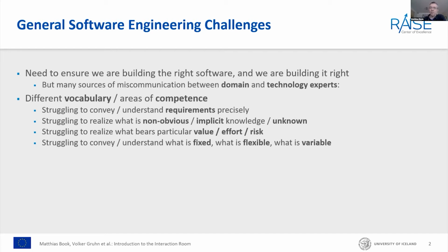So the domain expert might say, well, if we don't get down to this level of precision, all the results will be worthless. The technology expert might say, well, if we are talking about this level of precision, that would require us to invest much more effort into computing resources or into the development of algorithms and so on. And so these value and effort drivers can easily become risk drivers, can become aspects that can derail a project if they're not recognized early on.